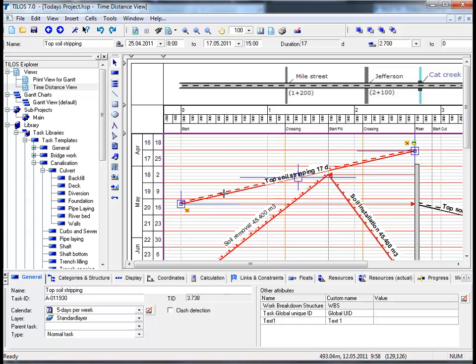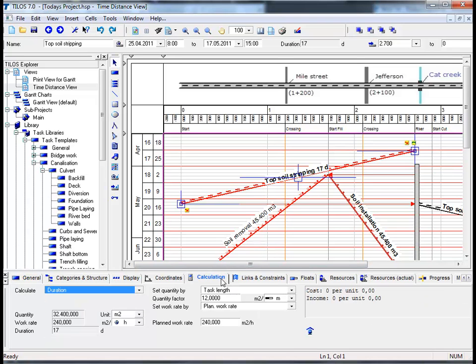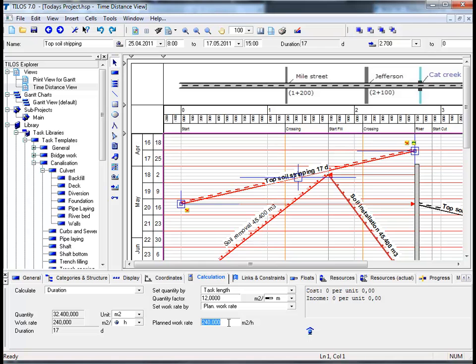From the previous session, we learned that it's possible to estimate the duration of a task without resources, solely on the basis of quantity and work grade. If we move to the calculation view tab in the details toolbar, we can see that in this specific case it was 240 square meters per hour which had to be achieved. We now want to move to the resources view tab in the details toolbar.